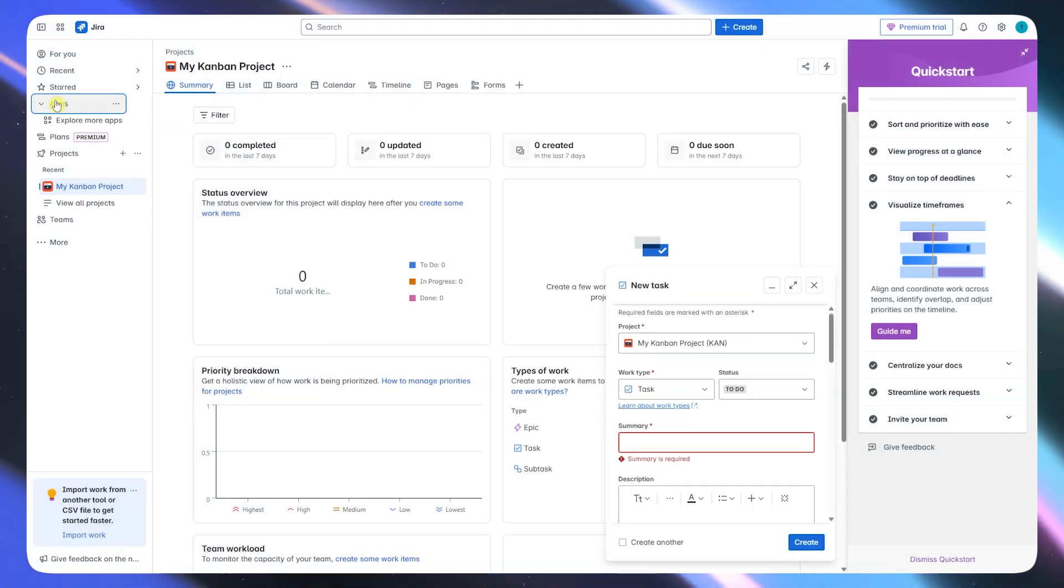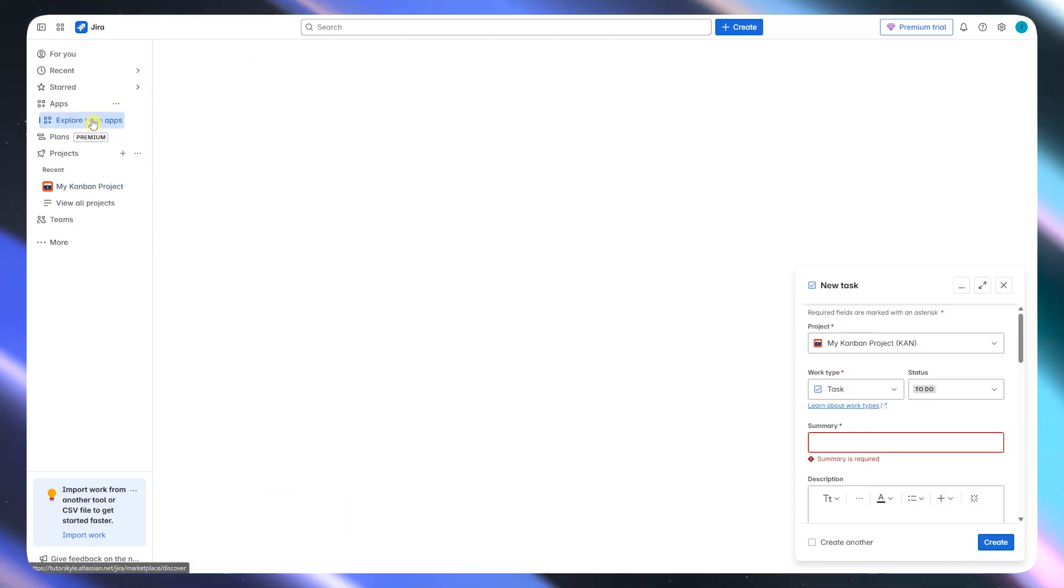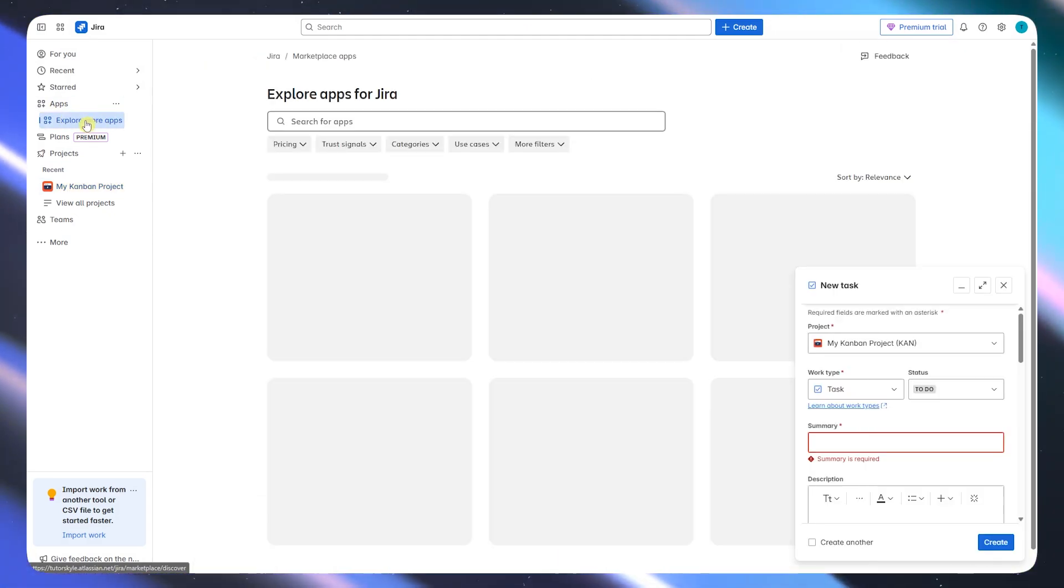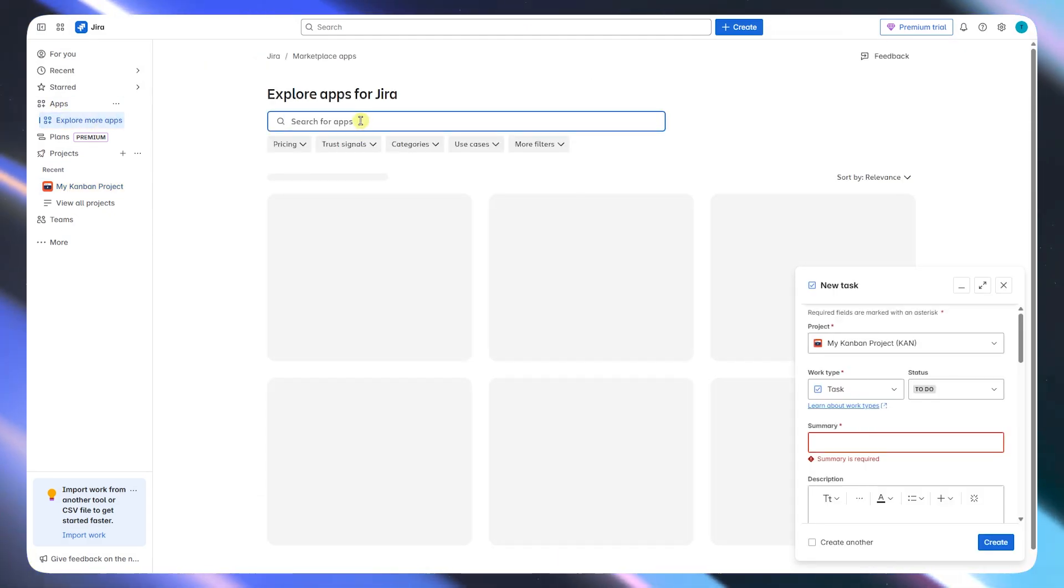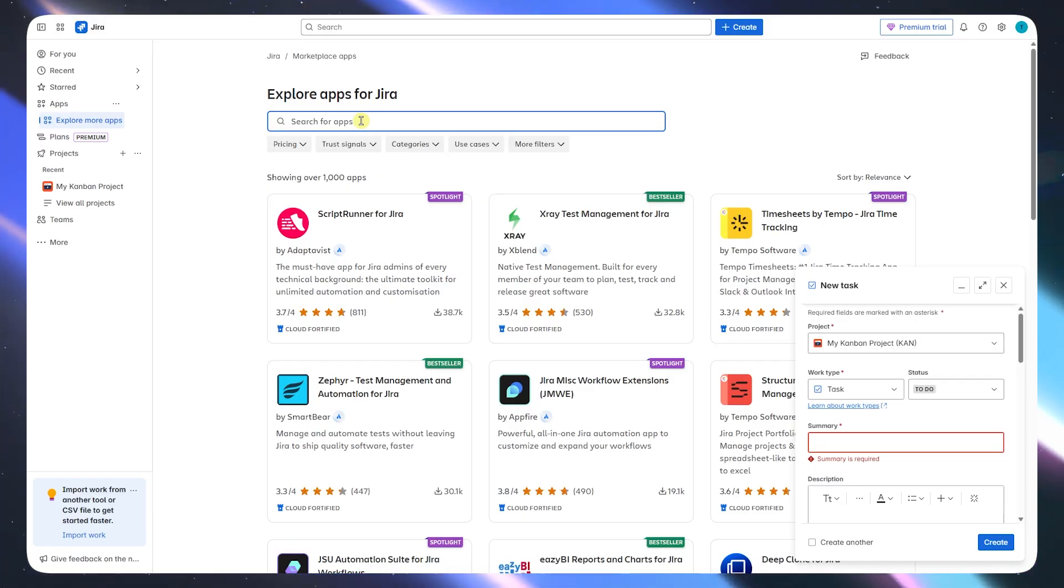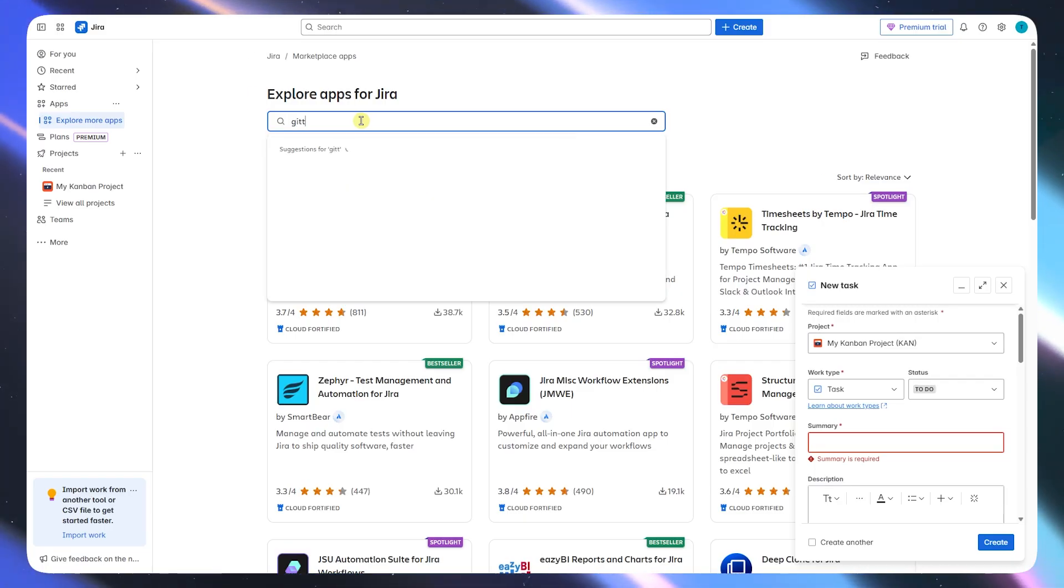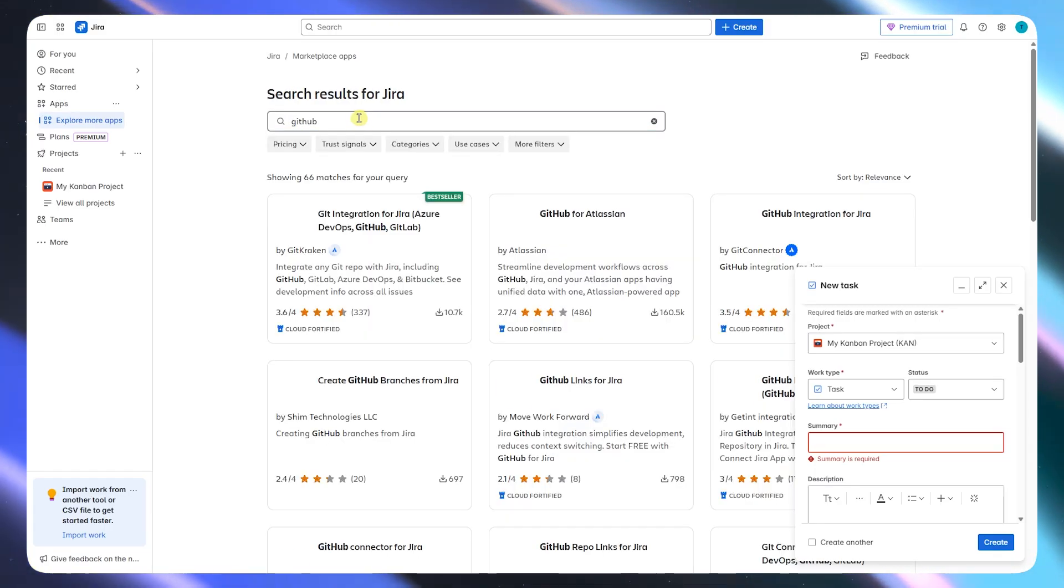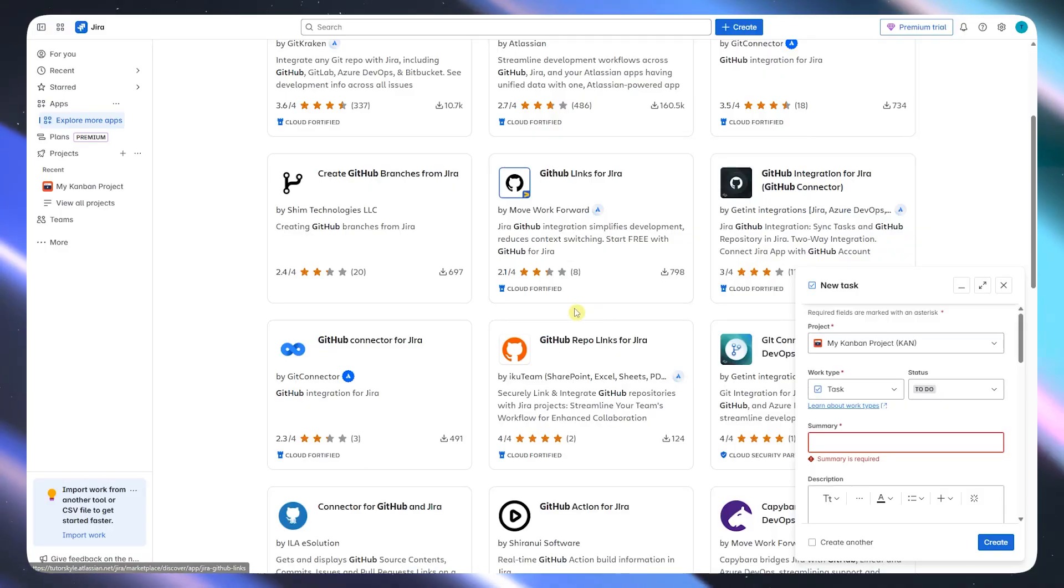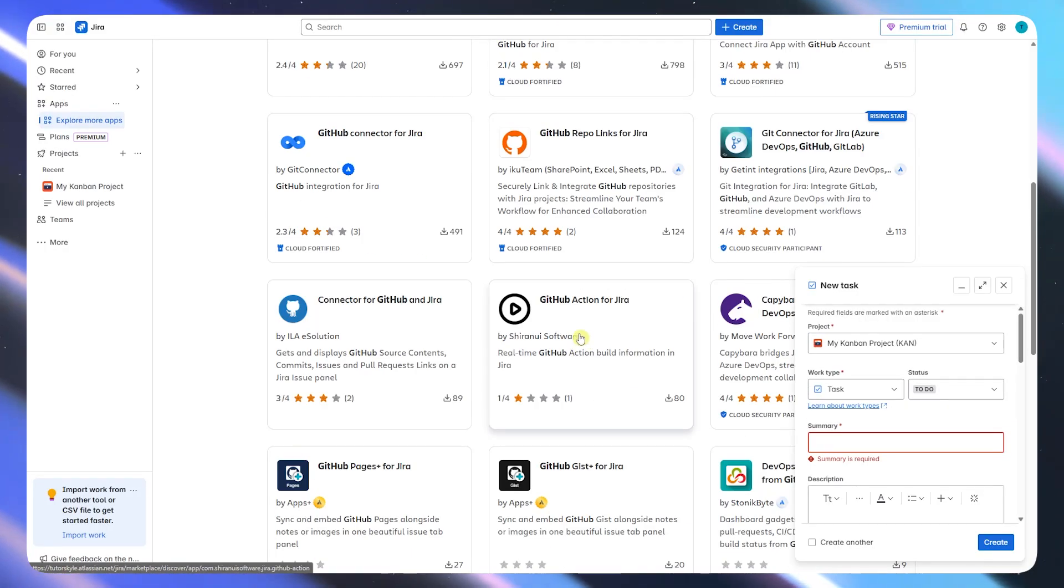Jira also shines with its advanced reporting tools like Burndown Charts, Sprint Velocity, Epic Tracking, and Backlog Health. This gives managers and stakeholders deep insights into how teams are performing over time.